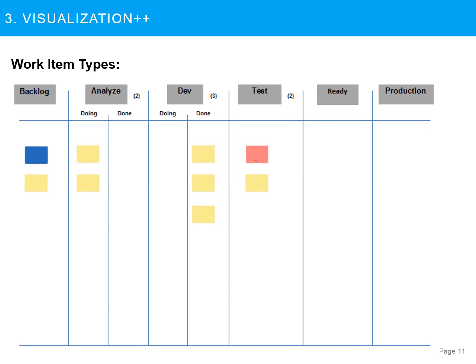Here's a change request, and those normal yellow ones are user stories. So how it helps, you ask? Well, we can say that 50% of the items on the board should be user stories, so we clear up our backlog. Or if the board started to turn red, it's a sign of too many bugs.